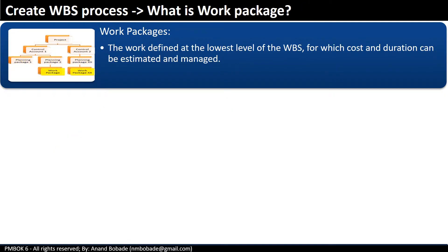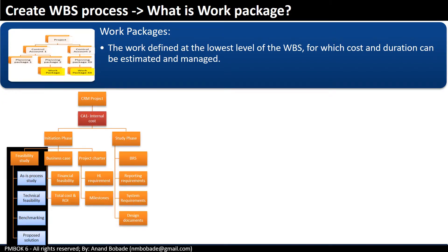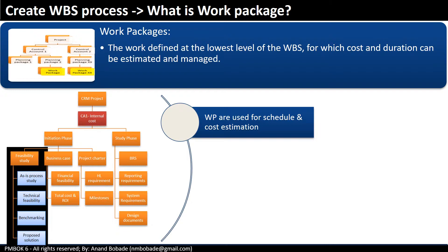Work package is defined at the lowest level of the WBS for which cost and duration can be estimated and managed. For example, feasibility study is a deliverable under the initiation phase. This deliverable can be further decomposed into work packages like as-is process study, technical feasibility, benchmarking, and proposed solution. In the same CRM WBS, build module 1 and build module 2 are high-level components. A work package can be a small function like user validation under one of those modules. In a construction project, work packages can be setting up a door, windows, or wash basin under a kitchen component. These work packages are used for schedule and cost estimation.